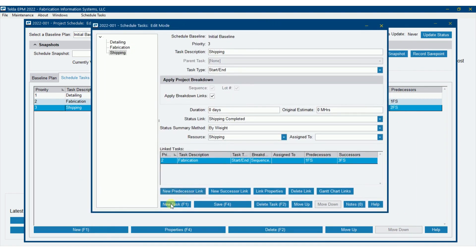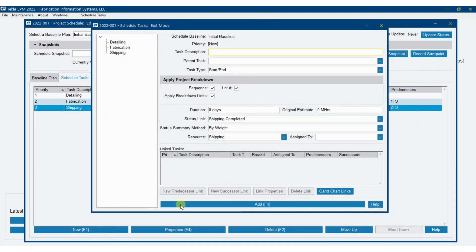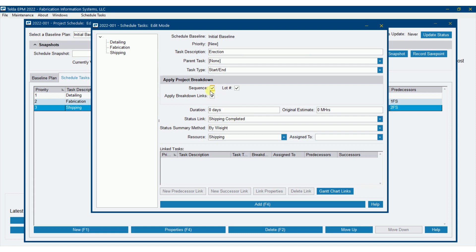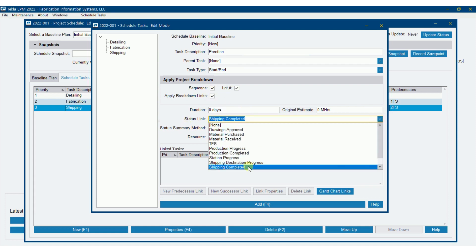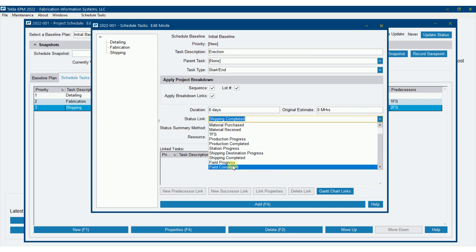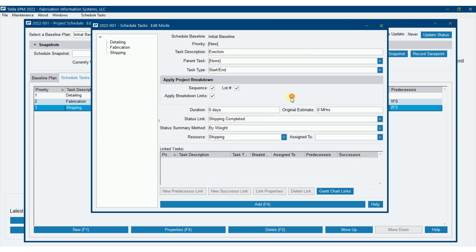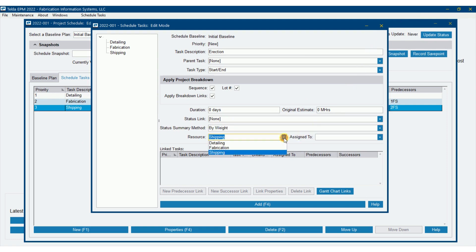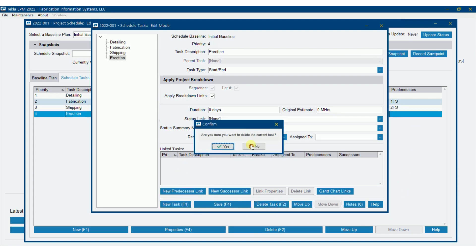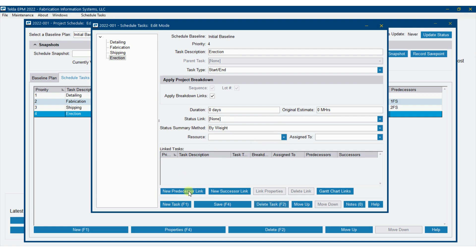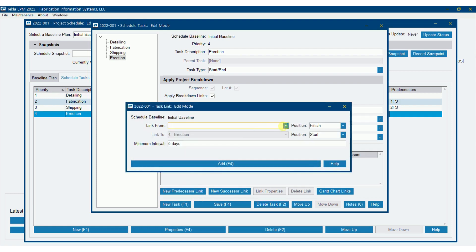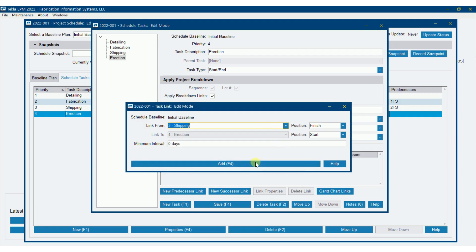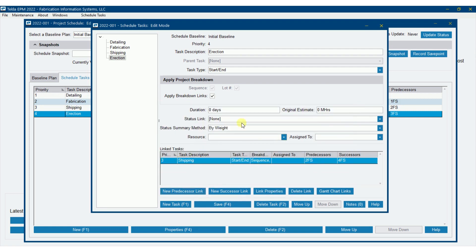You can see I'm going to do one more here. Let's go new. We're going to go erection. Apparent task, there is none. Start end. We're going to break it down. And here I could tie it to field stations if I wanted to, but I don't have any field stations set up. So I'm not going to tie this with anything. I'm just going to blank it out. Alright. So resource, I don't have someone out erection, so I have no resource I want to assign to it. So I'm going to add that. And whoop, I accidentally double clicked. And now I'm going to say new predecessor link for erection is going to be shipping. And we're going to add.